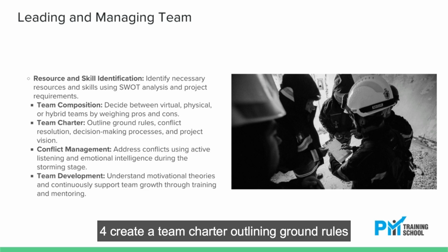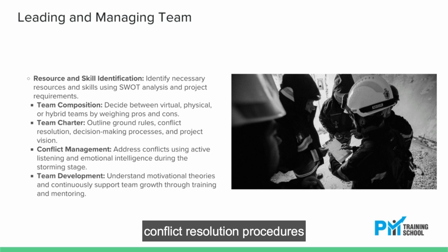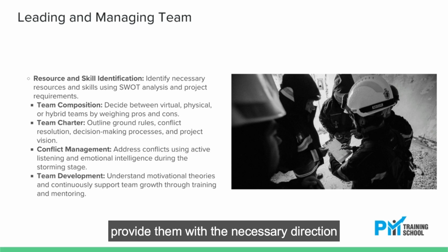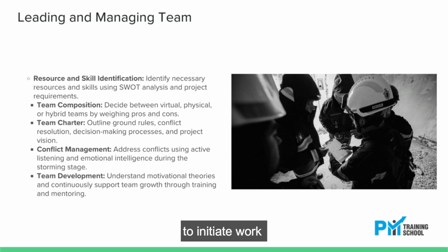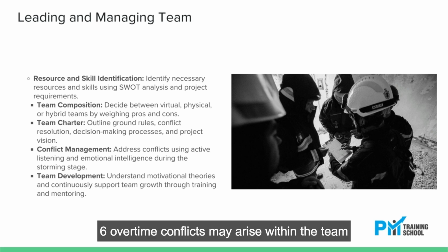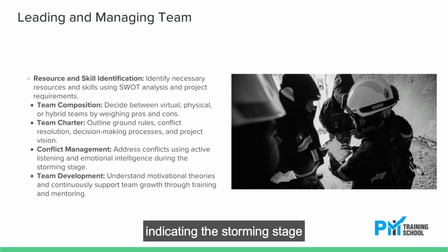3. Hire team members according to the skills needed for the project. 4. Create a team charter outlining ground rules, conflict resolution procedures, decision-making processes, and the project's vision. 5. At the beginning, when the team is in the forming stage, provide them with the necessary direction to initiate work.